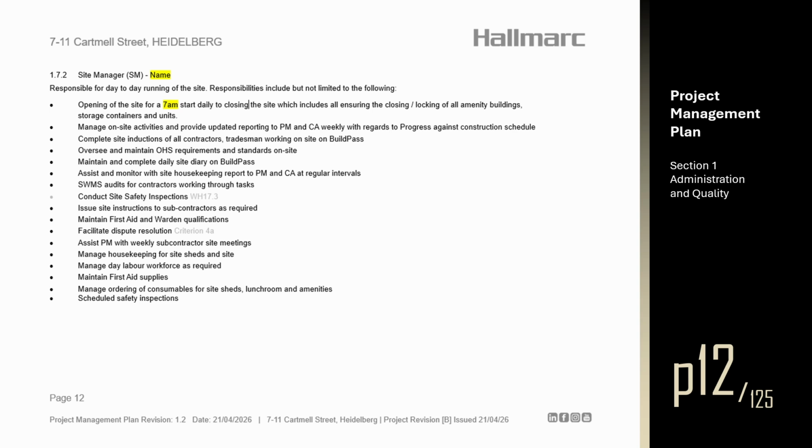Section 1.7.2. Site Manager. Responsible for day-to-day running of the site. Responsibilities include but are not limited to the following: opening of the site daily to closing the site, which includes ensuring the closing and locking of all amenity buildings, storage containers, and units. Manage on-site activities and provide updated reporting to project manager and contracts administrator weekly with regards to progress against construction schedule. Complete site inductions of all contractors and tradesmen working on site on BuildPass.